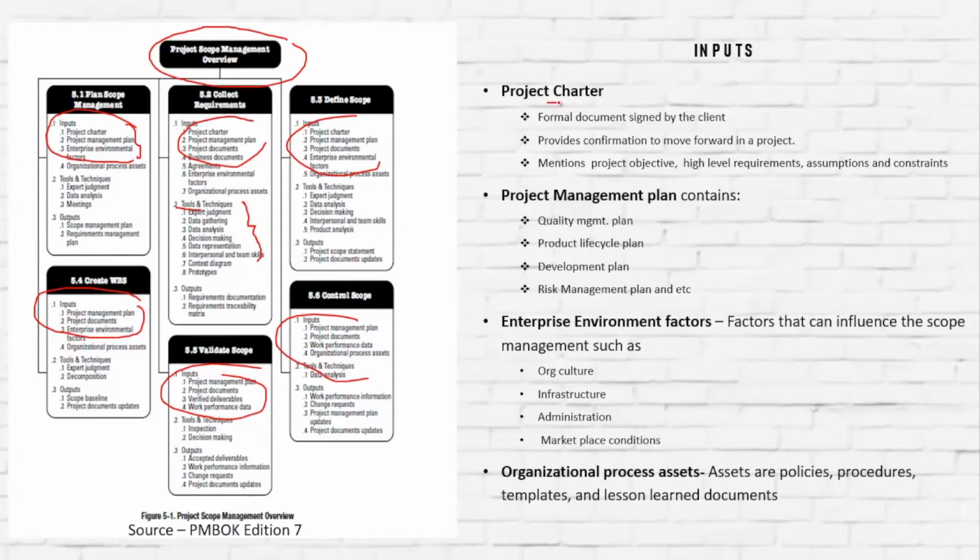What is project charter? Project charter is a formal document that is signed by the client. It provides confirmation to move forward in a project. Without the project charter, we cannot assume that we have received a green light from the stakeholder, and it's an absolute necessity. It also mentions project objective, high level requirements, and assumptions and constraints.